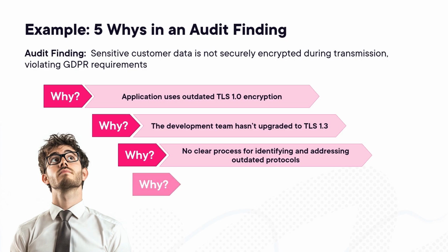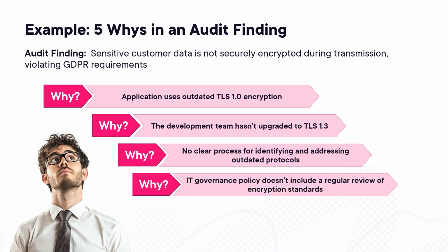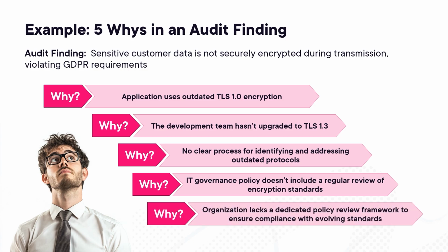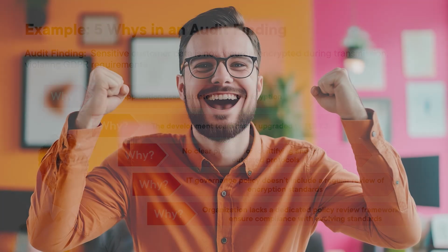And as you might guess, why? Well, IT governance policy doesn't include a regular review of encryption standards. Well, why? Well, the organization lacks a dedicated policy review framework to ensure compliance with evolving standards. So now we've actually gotten down to the root cause of the issue.